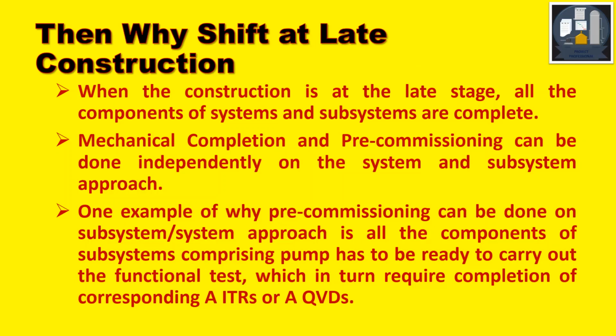One example of why pre-commissioning can be done on subsystem is that all components of systems or subsystem, like the system comprising a pump, have to be ready to carry out the functional tests, which in turn require completion of corresponding AITRs or AQVTs. So that means we have to shift to this systemized approach before the mechanical completion, means before the walkdowns.